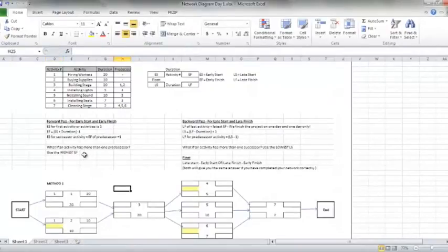We use the highest early finish of the predecessors. That means we're going to use the 20, because 20 is greater than 10. That's not difficult. We use the 20. Now, what's the formula? The formula is that predecessor plus 1. So I take 20 and I add in 1. So I start activity 3 on day 21. And that makes sense because activity 1 ended at the end of day 20. So we come back in the next morning and we start off activity 3.